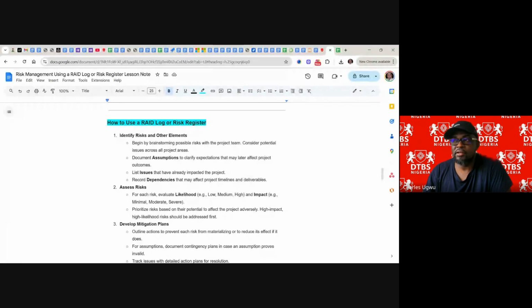So any day the main internet source goes off, everybody switches to the proxy server. And you find out that we are not going to lose even 1 hour, just like 5 minutes. You've already switched to the proxy server and you continue your work. So this is assessing and addressing risk.